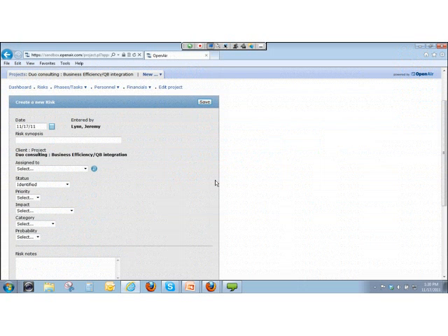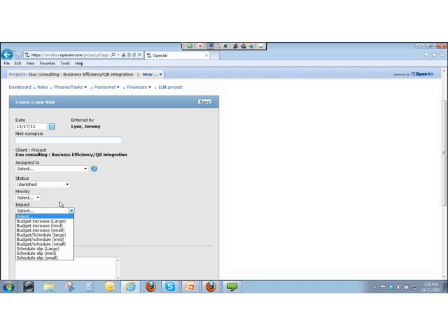So the date of the risk, and a general synopsis, categorization, or title of the risk. If I wanted to make someone an owner or control of it, what's the stage it's in? What kind of priority is this? What kind of impact would it have on my budget or my schedule? And of course, I could add more to this list as necessary.